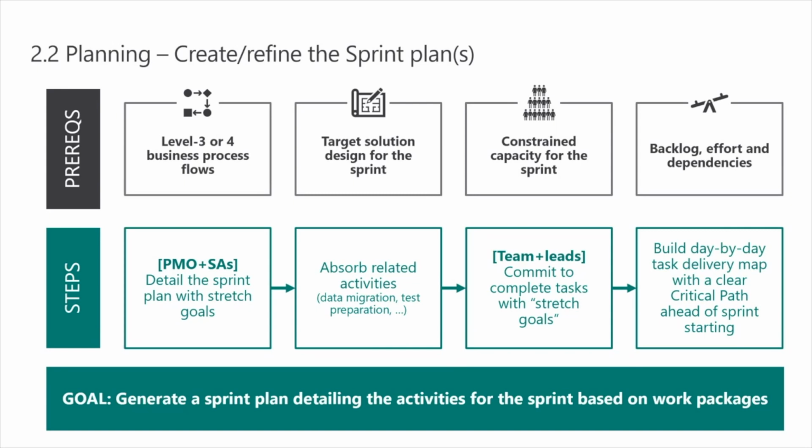Yes, that defines the next few sprints in sufficient detail. I can see that the sequence of processes we're going to deliver makes sense. From a technical perspective, it's got the right dependencies. I'm creating the right objects before I rely on them on the next sprint, and so on.